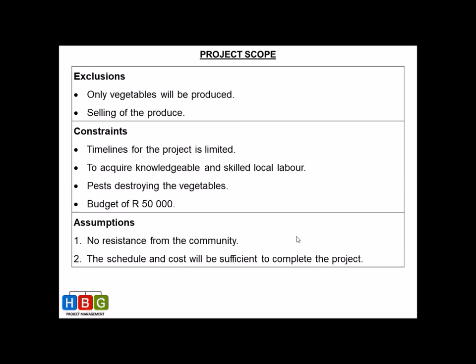Lastly, assumptions. An assumption is something you assume to be true without having proof. We include assumptions because we don't have all project information yet, but we must go ahead and plan. As the project progresses, you'll see if assumptions are true or false — if true, they become facts; if false, you adjust the plan. In this case, we assume no resistance from the community, and that the schedule and cost will be sufficient to complete the project.